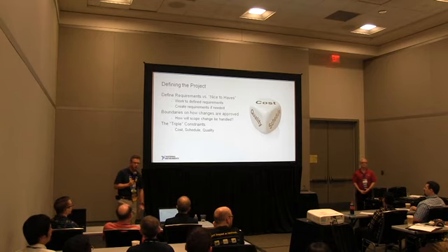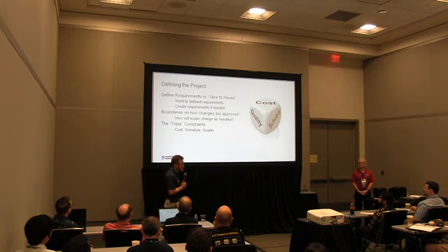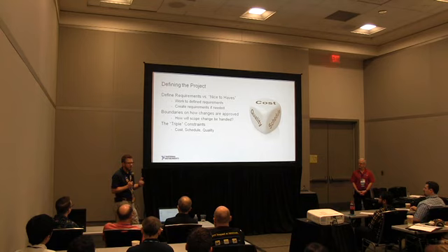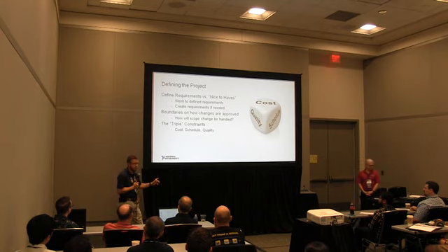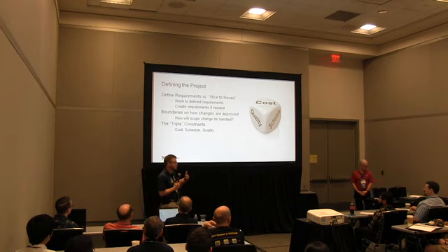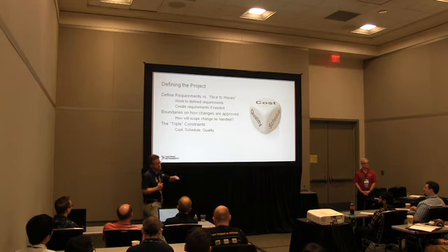Yeah, so the question was, how do you handle feature creep? How do you handle these nice-to-haves? We talk a little bit about that later, but I find that if it's really nice to have, as a developer, you're like, wow, for just a little more effort we could put this in, talk to your customer. Come to an agreement. Put in a change of scope or de-scope something else. But again, you got to get approval up front.